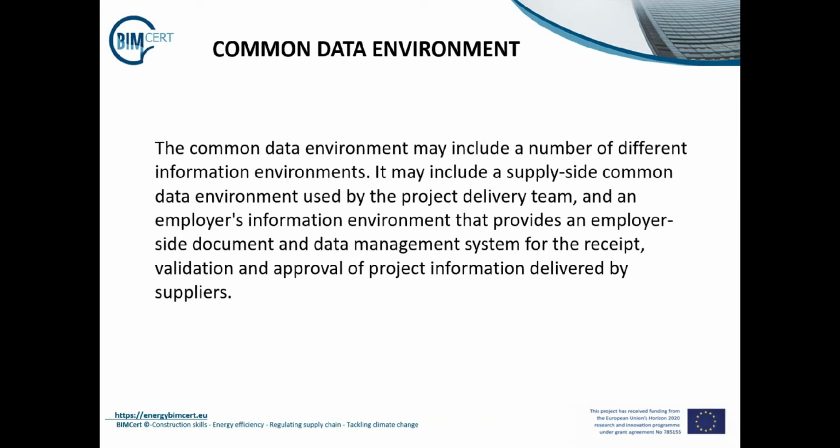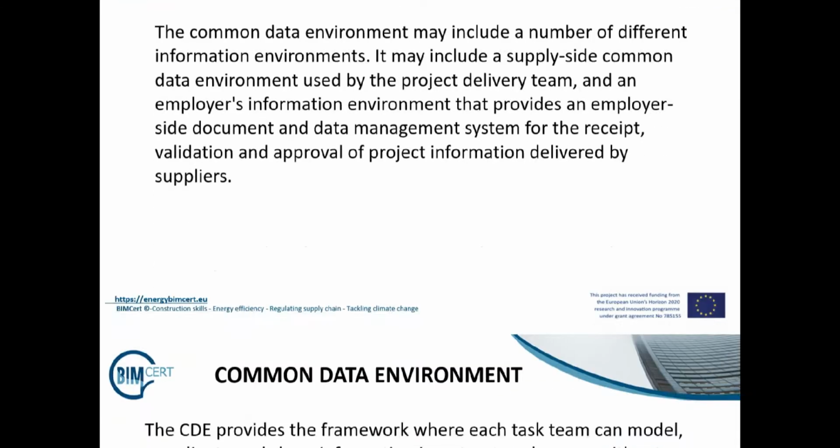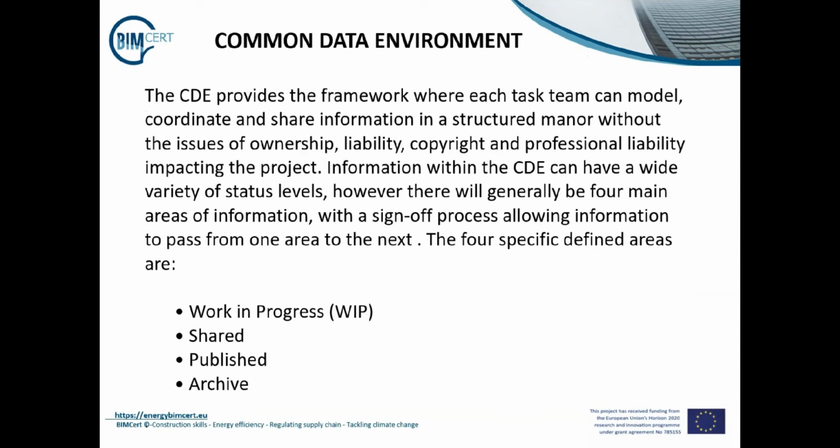The common data environment may include a number of different information environments. It may include a supply-side common data environment to be used by the project delivery team, and an employer's information environment that provides an employer-side document and data management system for the receipt, validation, and approval of project information delivered by suppliers. The CDE provides a framework where each task team can model, coordinate, and share information in a structured manner without the issues of ownership, liability, copyright, and professional liability impacting the project.